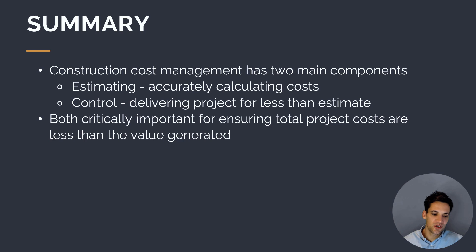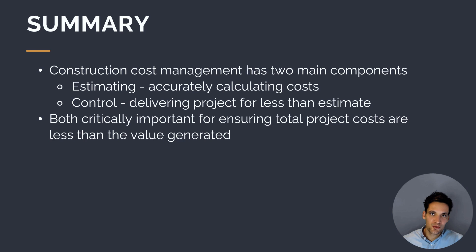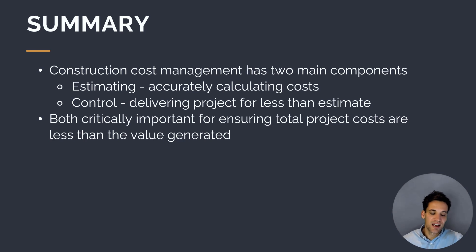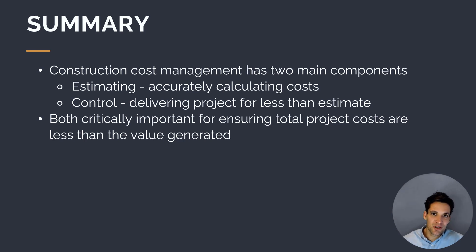To summarize: construction cost management is all about ensuring that our projects are a financial success by delivering the project work for less than the costs we estimated. Construction cost management has two core processes: estimating costs — accurately estimating how much it's going to cost to do something — and controlling costs — delivering the project work for less than our budget. Both functions are critically important to project success, and we need to be thinking about and managing money throughout the entire life cycle of the project.